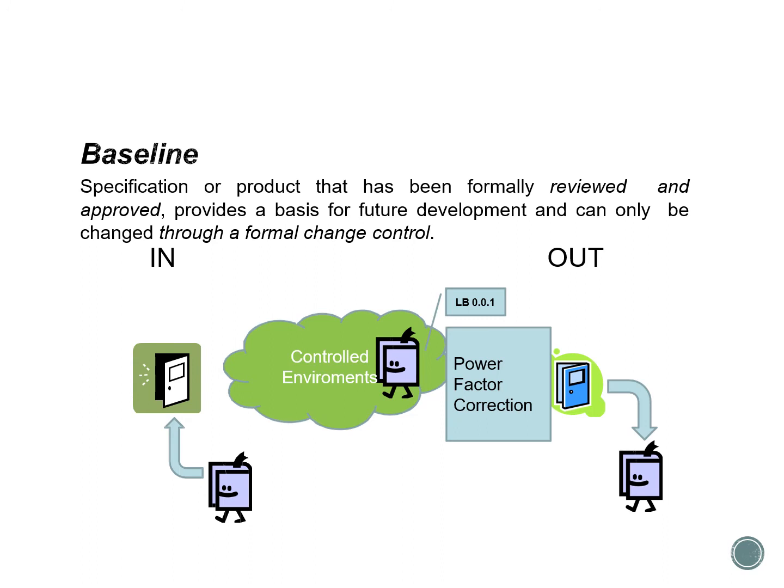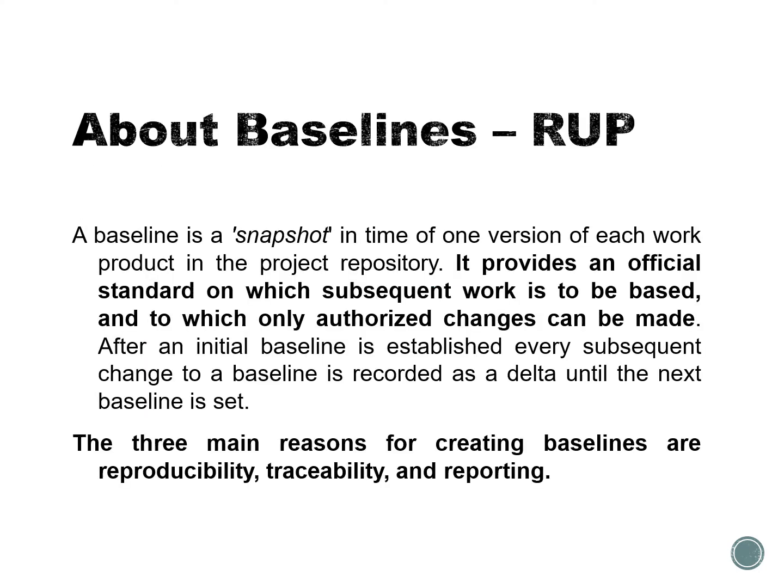And this is just a decision, but this also means that you need to have the capability of identifying when your product is of high enough quality, fulfills all the current requirements, and is stable enough so that you can use it feasibly. If you select a baseline version which does something crazy or isn't stable, you will be again and again and again fixing the problems caused by unfinished core systems or core functions, and that's going to be a very bad situation in the long run.